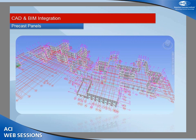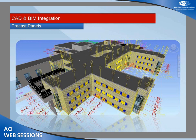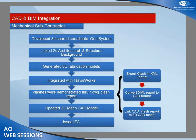There's the precast CAD work. We took the precast CAD submissions, flipped them up on the building, and assembled the building envelope with all the cut lines. Then we brought the model into that and evaluated each elevation to make sure every single window, opening, penetration, and foundation wall was fully coordinated with those CAD files. The key is pulling content from the people responsible for doing the site work — if we produced the model of those lines and gave it to the subcontractor, they wouldn't necessarily incorporate that into their work. It's much more effective to pull their work from them, integrate it into our work, check it, and give them feedback — and they're responsible to make sure what they do in the field matches their work.